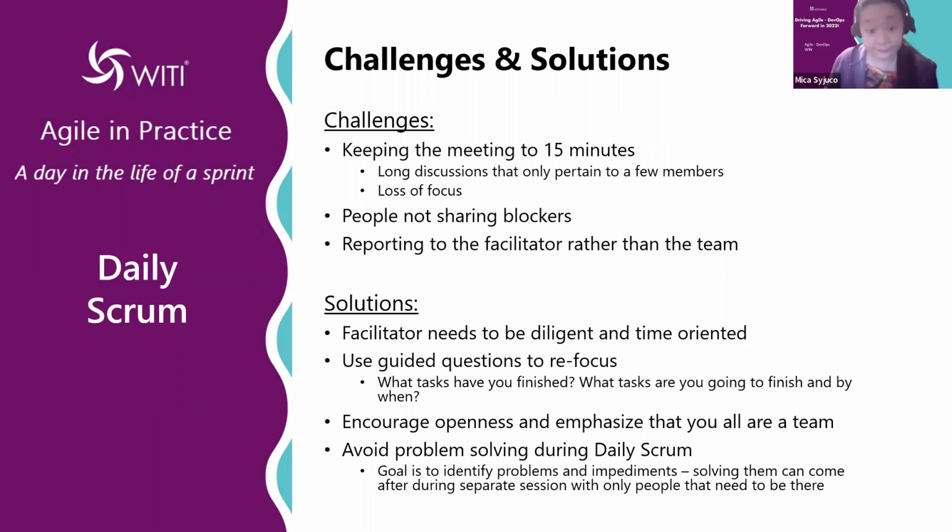And also budgeting, when you roll it up to the portfolio level, at the program portfolio, you need to understand the cost associated with the story. The story costs 5 points. You're taking into consideration this estimation is across the testers and developers providing their input, how much this story costs us, how much this feature costs us, because all the story points are going to roll up to the feature. Roll up to your feature, yeah.